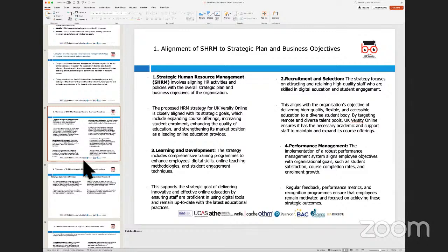So if the outlet has been acquired on a long-term lease, it needs fitting and refurb, which will take 2 months. And then once it is ready, it will need stocking, which will take another 2 weeks or so. And then some part of the staff in terms of opening the outlet, training and development. And this is what the HR would need to put into some sort of a timeline.